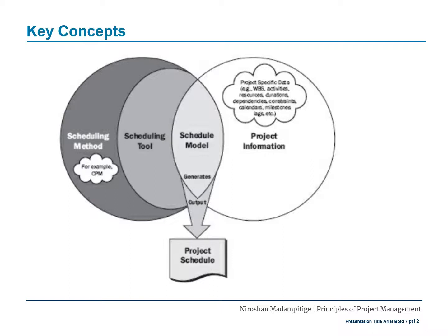For smaller projects, defining activities, sequencing activities, estimating activity durations, and developing the schedule model are so tightly linked that they are viewed as a single process that can be performed by a person over a relatively short period of time. These processes are presented here as distinct elements because the tools and techniques for each process are different.